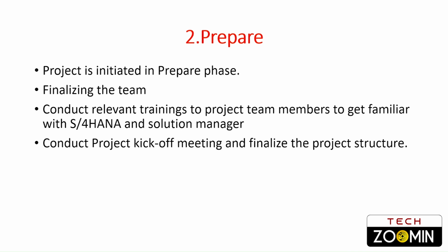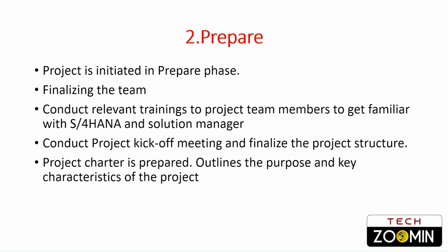In this kickoff meeting, project related activities are discussed and the project is finalized. As part of the kickoff meeting, a project charter is prepared, which is a formal document. This document outlines the purpose and key characteristics of the project. It is a readily available document for the project team members that can be downloaded, and it is very useful to speed up the project delivery. That's why it is prepared, and SAP related activities are also done in the prepare phase. So all these activities are done in the prepare phase.